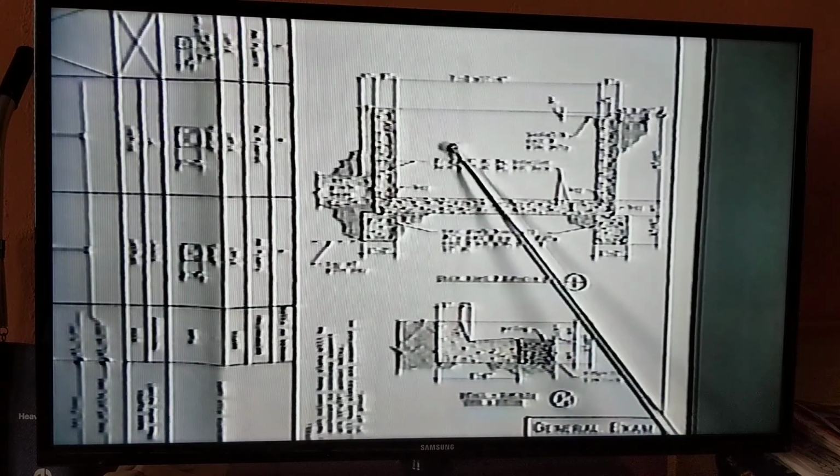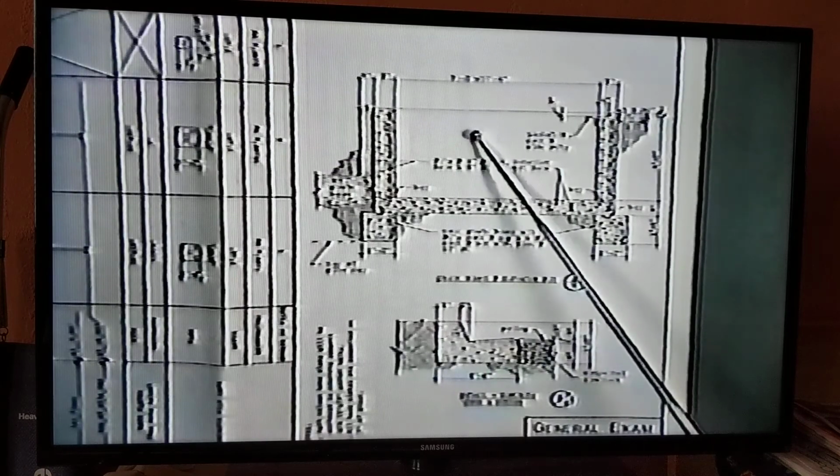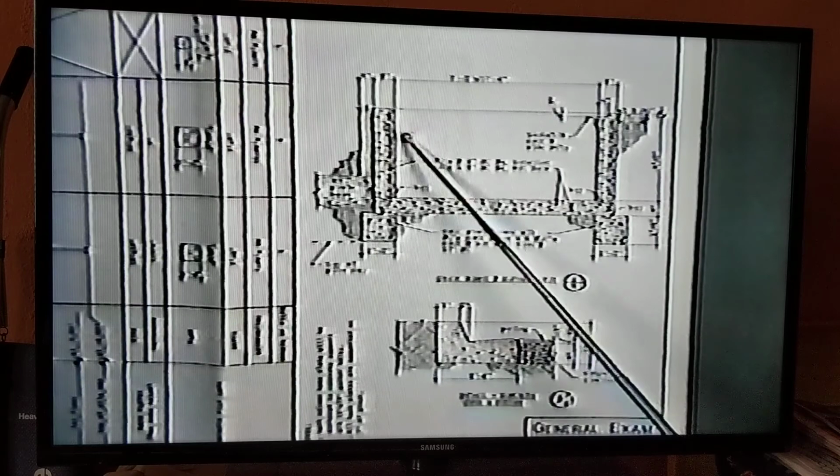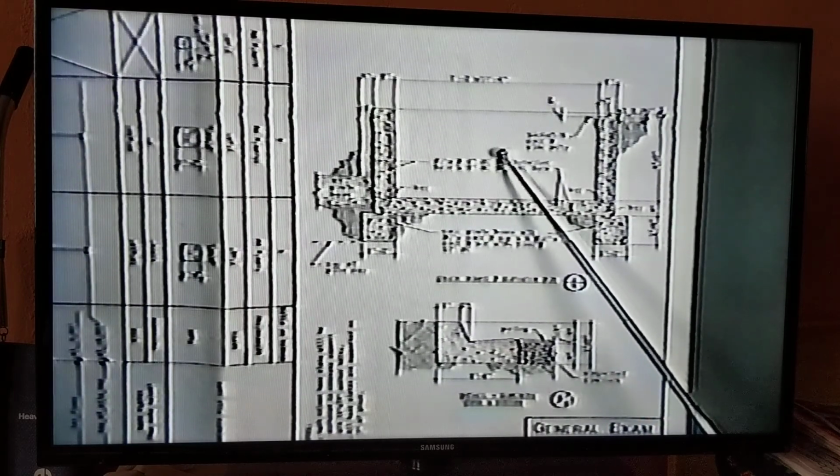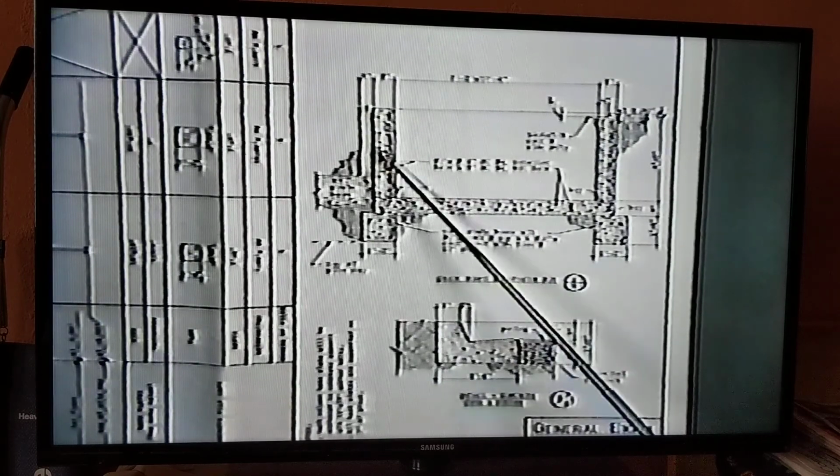And what you will get would be a solid cube, which you could pretend was full of concrete. Then you could multiply the interior dimensions all together, and you would get the void inside the solid cube. You subtract the void from the solid, and you're left with the net.